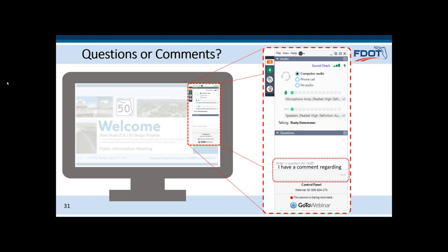And just to give everybody an idea of how the timeline works, if we had funding today, we still have about 6 to 12 months worth of design, and then about 2 years to acquire and get the property set up, and then about another 6 to 12 months before it would start construction. So if we had funding, unless something happened to really speed things along, we're looking at least 3 years before construction would start. Thank you, Jeff and Phil.